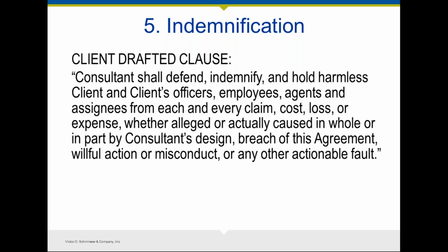Pretty much with an indemnity obligation like this, almost anything can be alleged to relate to your design, your breach, or your action. Your indemnity obligation is actually not even triggered by your responsibility, but by, it looks like, an allegation.